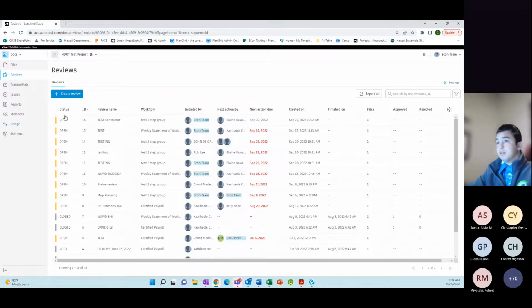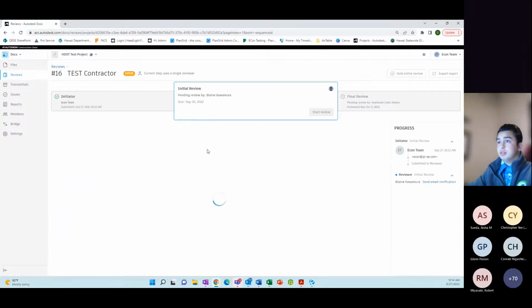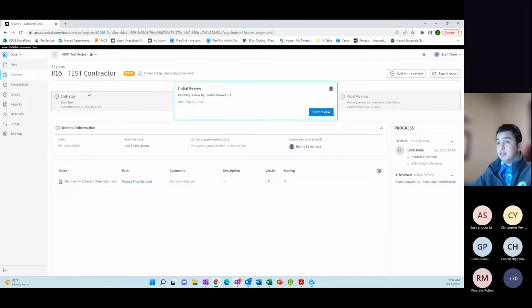So if you go into the reviews, here's all the reviews that people have to look at. The engineer can go in here and take a look at your review. First of all, I started off the review. This would be you in this case. Then somebody would be reviewing it. This is the person who's reviewing it. And once that person reviews it, it'll go to final review, to a manager of the project. Then that manager will close it out, and they'll notify you that it's either approved, acknowledged, or there's a comment.